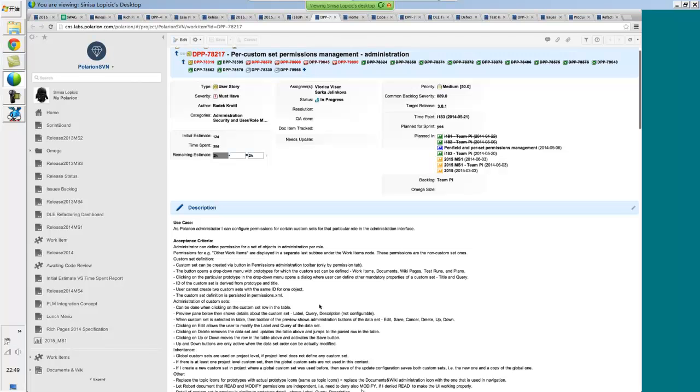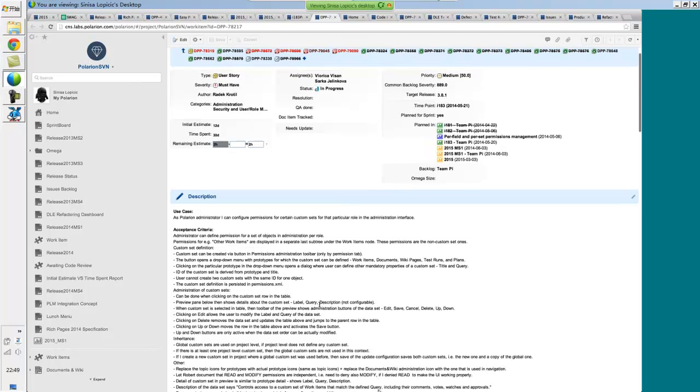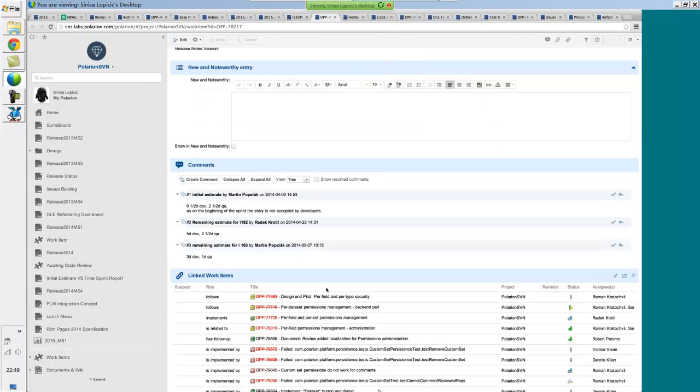One more thing that we do during the sprints, and we'll touch base again on more execution in the stand-up meetings, we do separate estimation for development and QA. The reason for that is that we have dedicated people who do development and who do the QA. Some companies, some teams are more flexible on this than others, meaning that they have an understanding that developers can also participate in a QA process or vice versa, and therefore they might do one estimation.